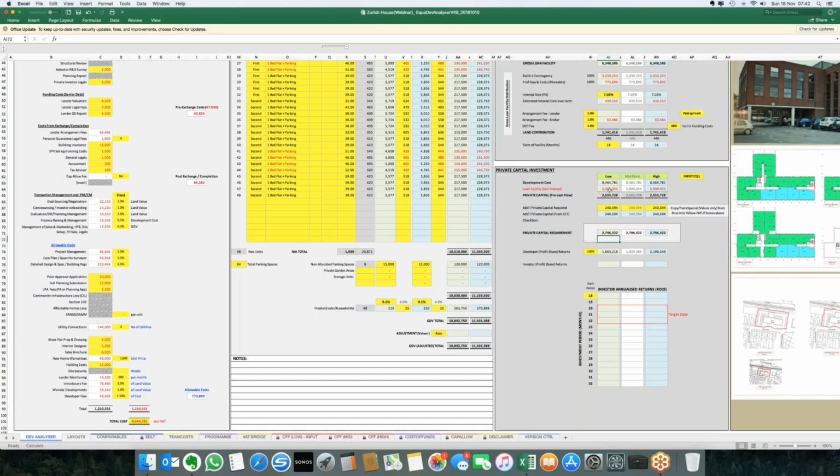We know what we're going to loan to you. Therefore, the difference is the cash you need to put in. No, that is not the case. What that doesn't consider is cash flow. It doesn't consider VAT payments and VAT recovery and the timings of that. So just need to be really careful around that.